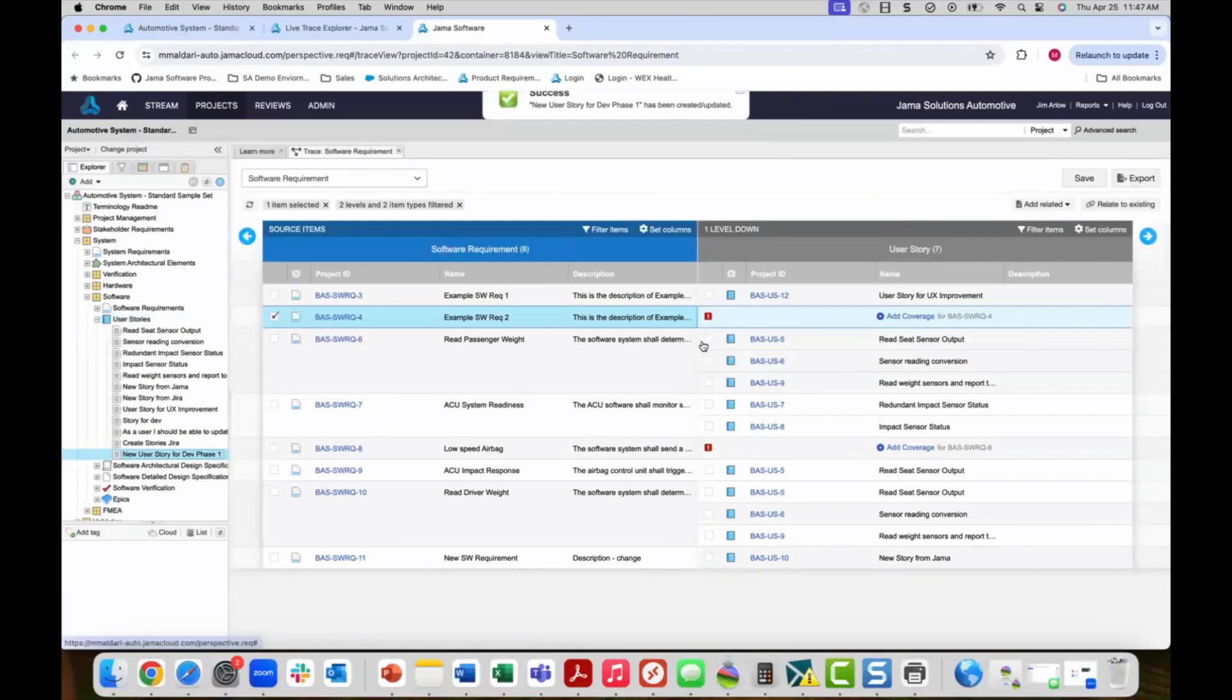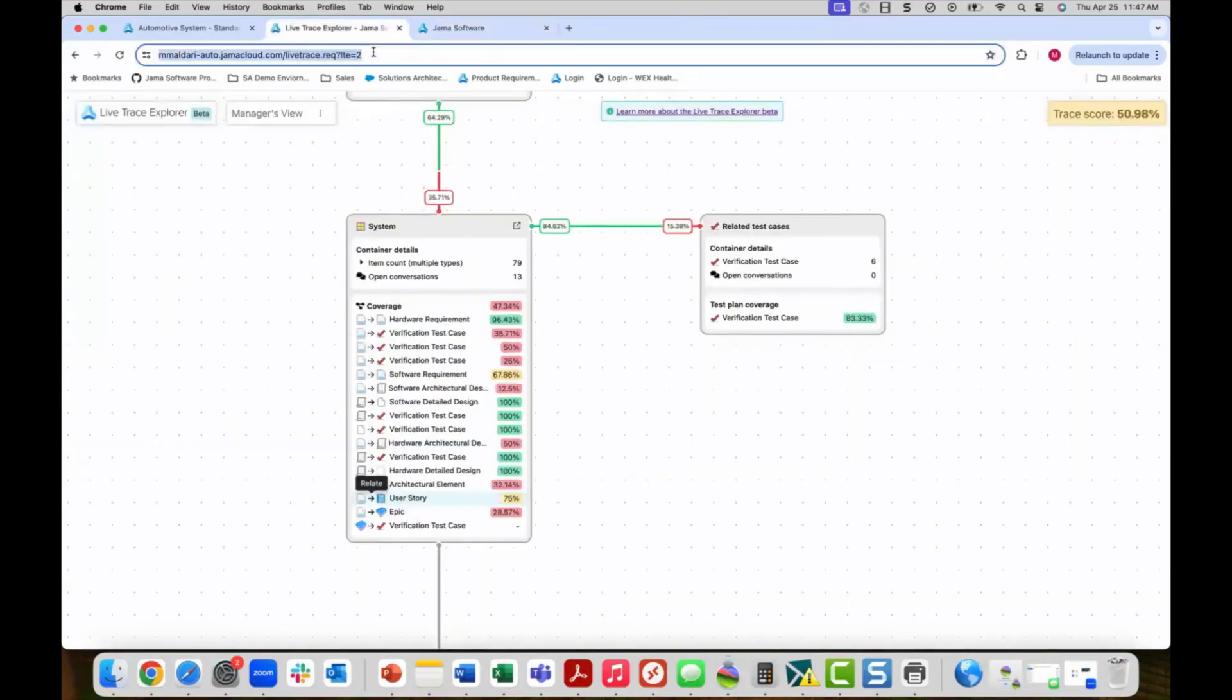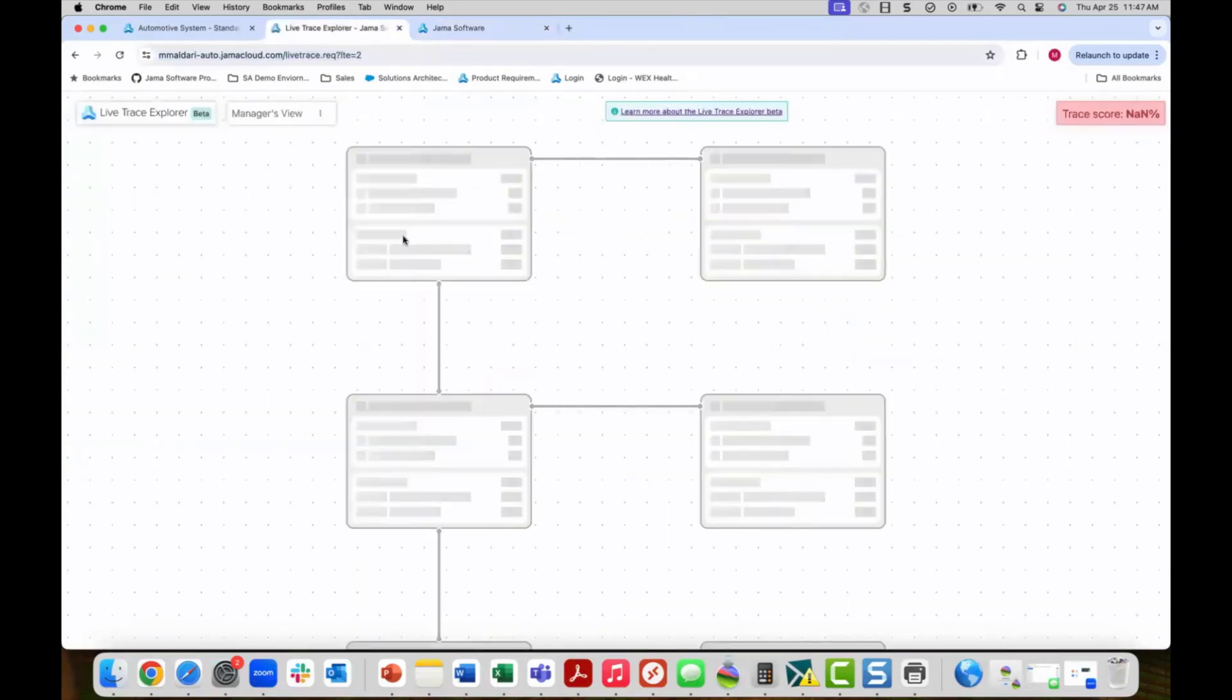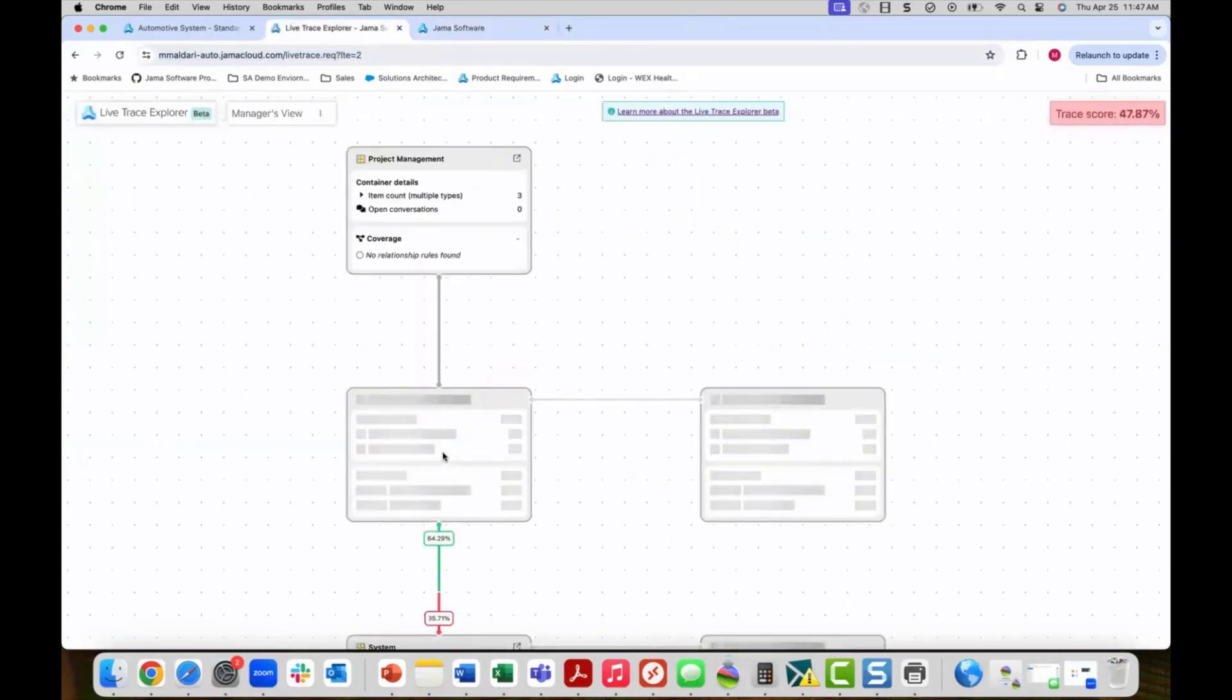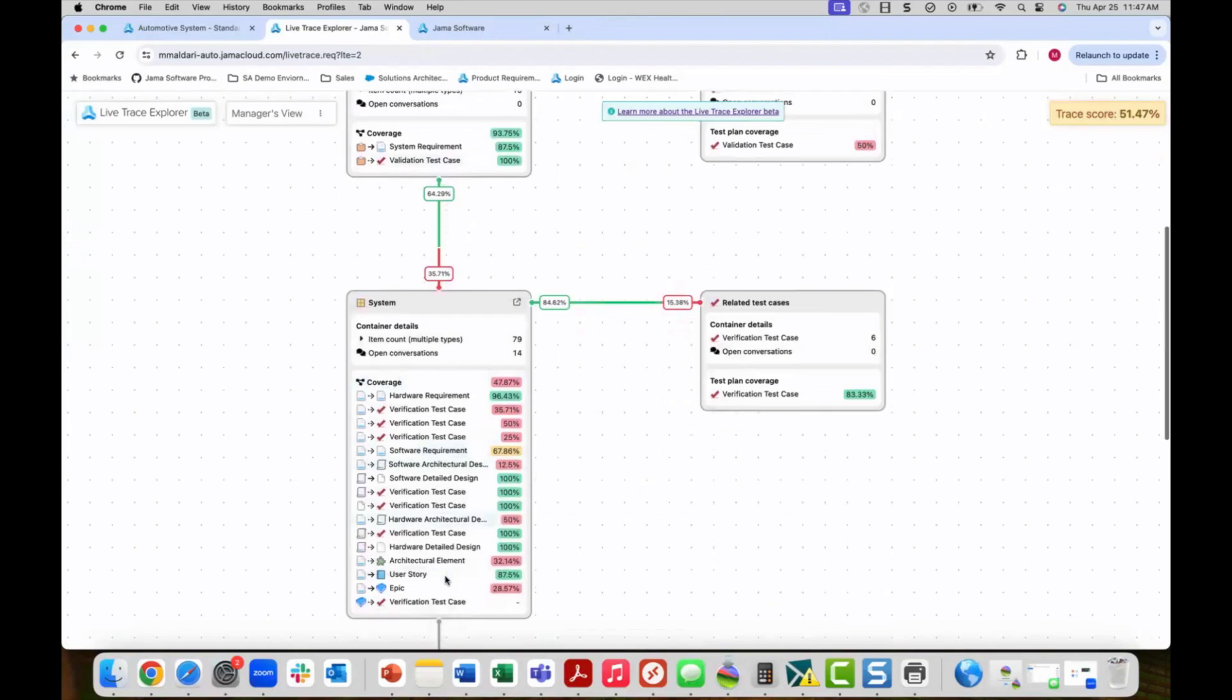Now let's go back to our live trace explorer and refresh the view. You'll now see that the software to user story coverage has improved to 87.5% and our overall traceability score has also improved. This trace view allows for continuous tracking exception and continued improvement.